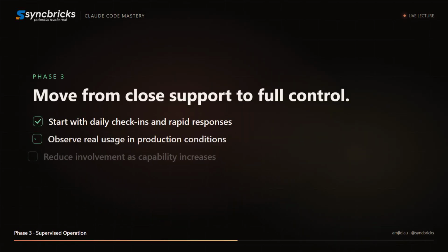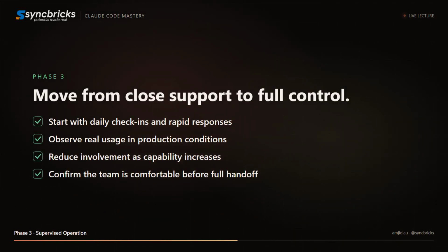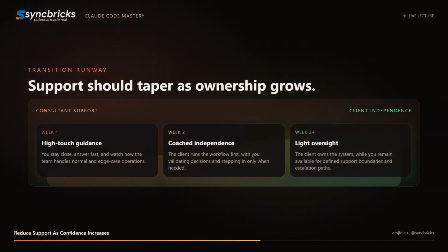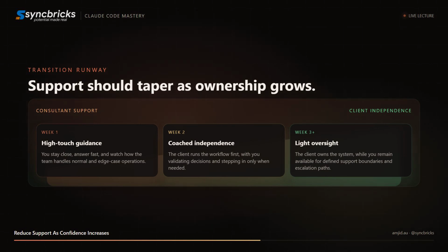The third phase is supervised operation. After training, allow the client to use the system while you monitor and support them. Start with close support, such as daily check-ins and quick responses. Then gradually reduce involvement, allowing the client to take full control.